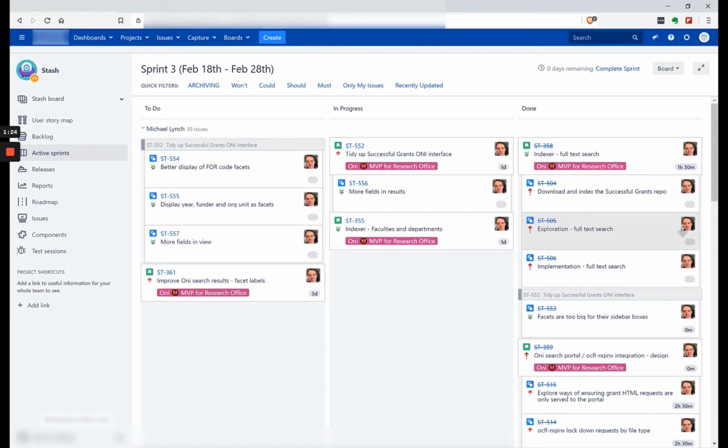In our case, in our project in particular, we're actually not using story points, but as a team, we decided that we wanted to estimate in hours. Okay, just because it makes it easier for us to manage the time, the workload, and the resource allocation. But you don't have to. You can actually do your estimation in story points if that is easier for you and for your team. Like I said, this is just an example.